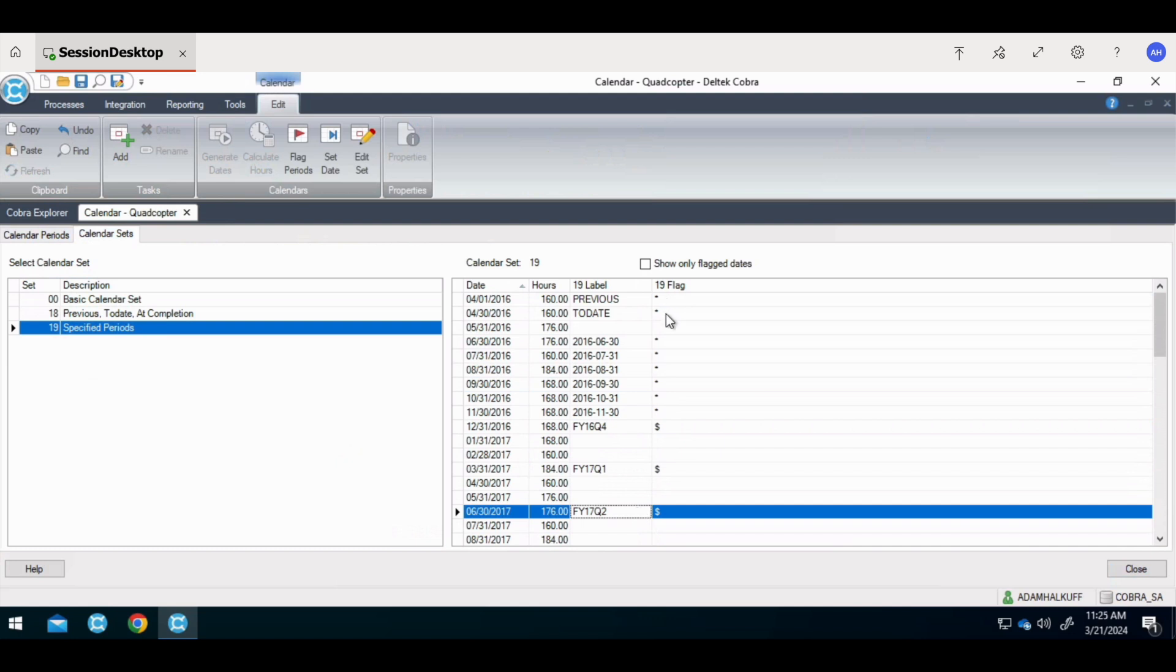On calendar set 19, the star or floating flag defines the periods that will advance to the next labeled period when the calendar is advanced. The dollar sign or fixed flag defines fixed periods that do not change as the calendar is advanced each month. For example, when the calendar is advanced, the previous to date and all months with the star will move down one period, while the fixed flags will not move at all.